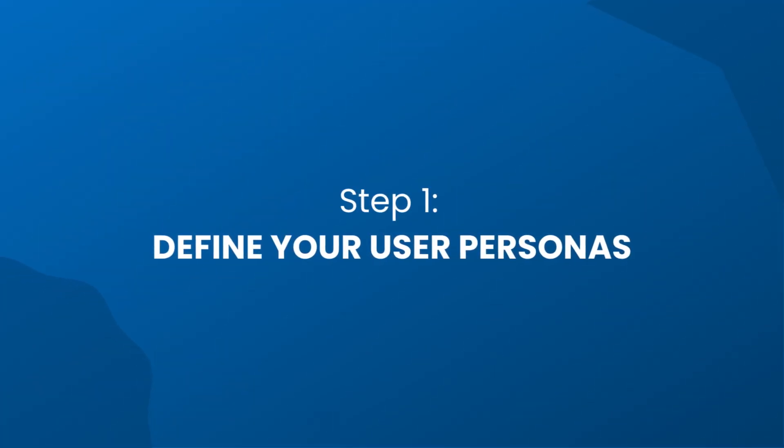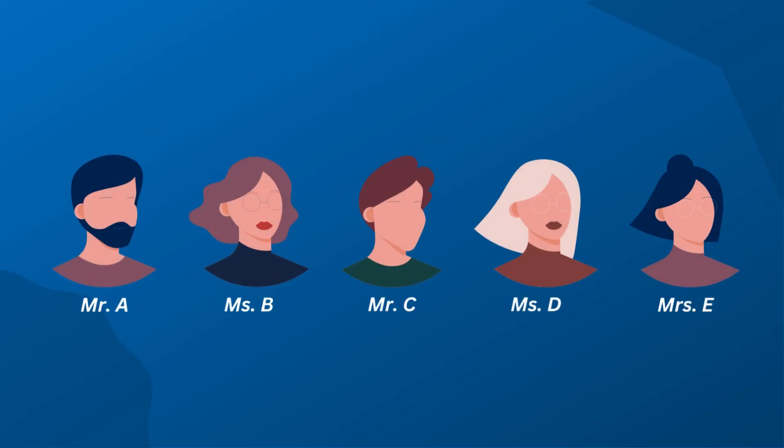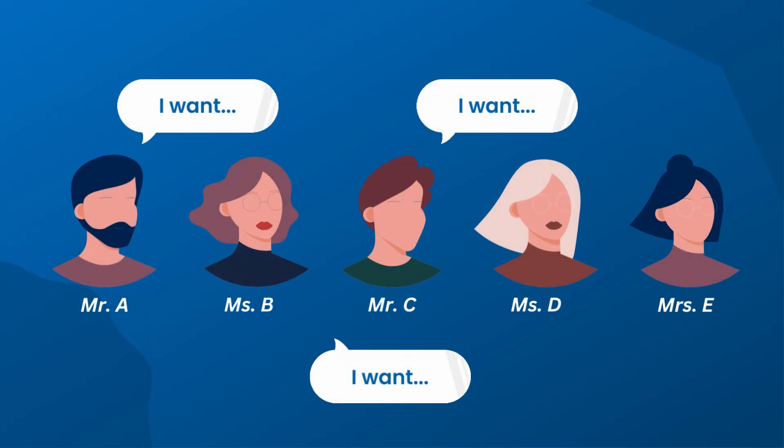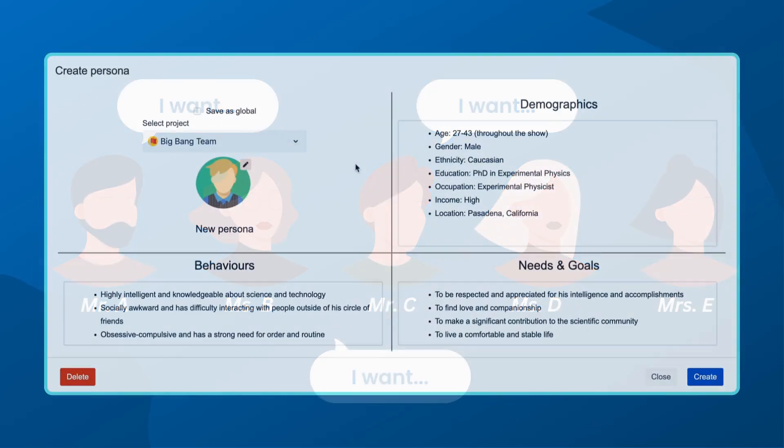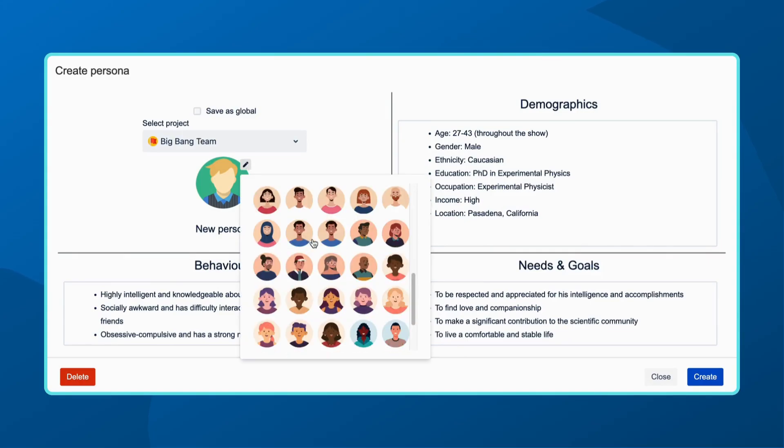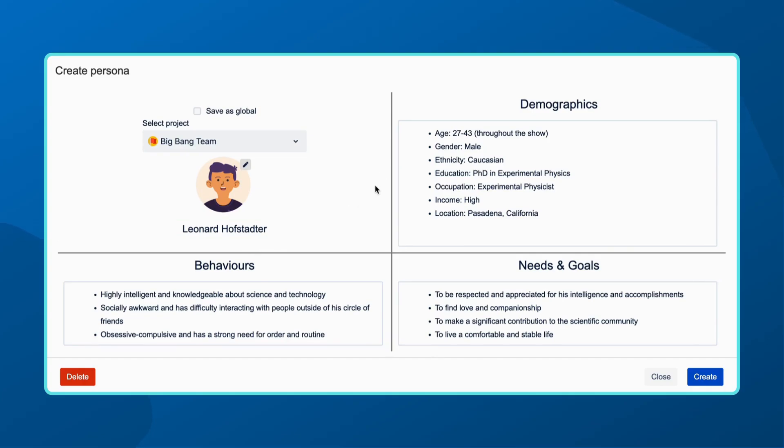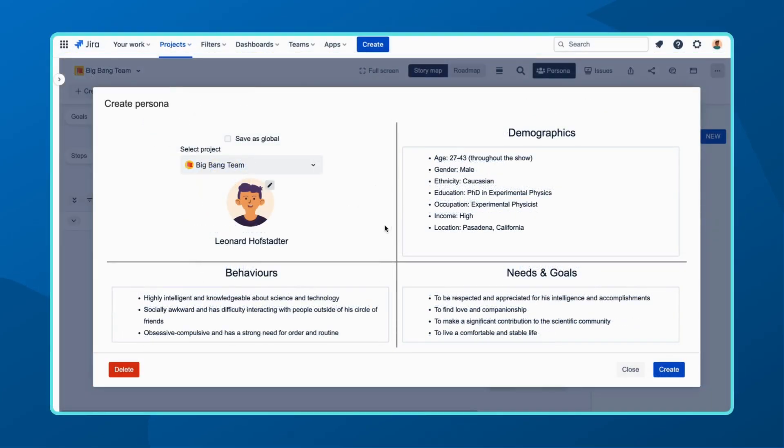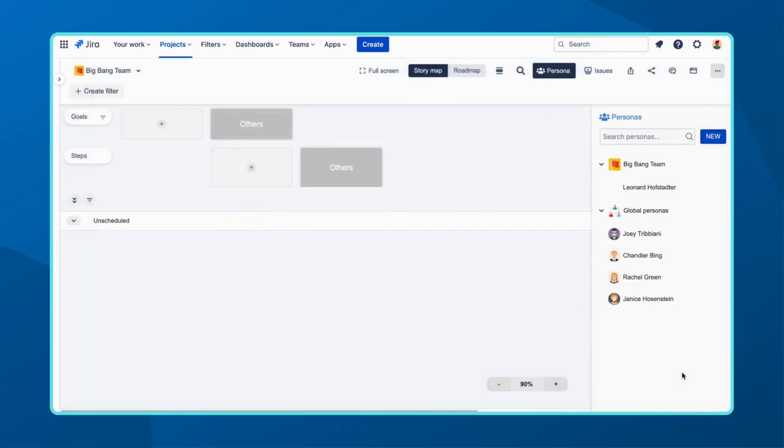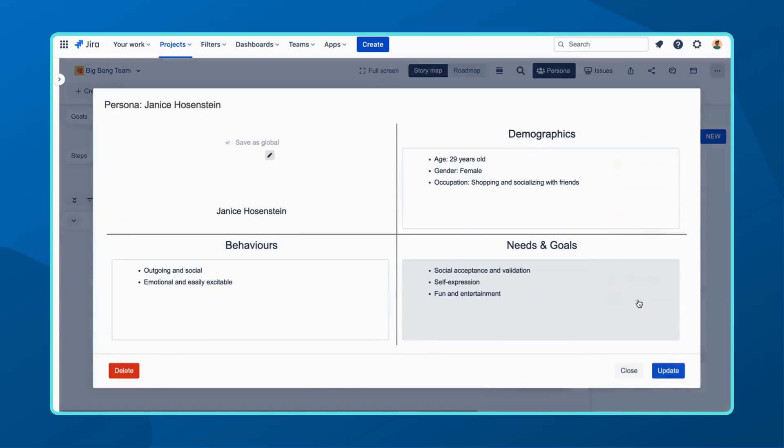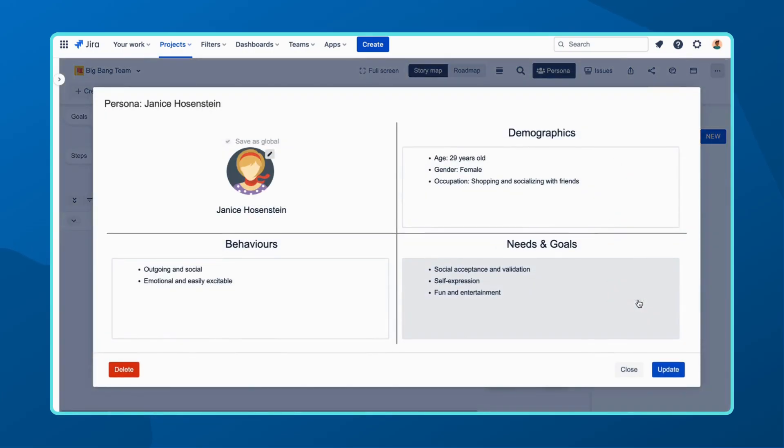Our first step is to define your user personas. These are fictional characters representing your target audience. Start by sketching out your personas' details, including demographics, behaviors, needs, and goals. This feature can be accessed by clicking here in ProductGo's user story map. This provides a clear understanding of who your users are and what they expect from your product.